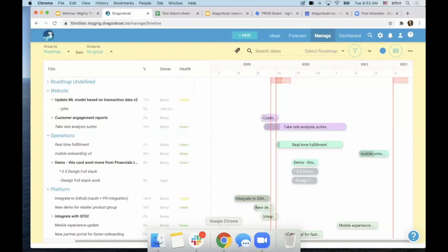And they're going to be assigned potentially multiple things, because we have to allocate some allocation for prod support. We also have to leave some allocation for filler work as far as small and medium enhancements. So we're trying to better estimate and be able to have that conversation with our stakeholders, saying, hey, you have given us 3 projects that we consider extra large, and we're not going to be able to do them all at the same time, obviously, because of resourcing.